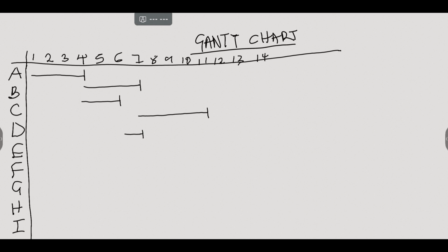Now we have gotten to F. Two activities precede F, which are D and E. Now remember that the preceding activity must finish before a new activity can start. We have two activities, D and E. D ends at 11 weeks, while E ends at 7 weeks.